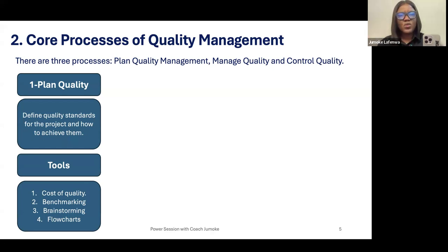The second one is when you spend money to randomly select items so that you can inspect what has been done. So you have cooked, or maybe you have produced shoes, and then you have testers. They will just randomly pick, and whatever they pick, they test. The outcome of the test will inform them whether generally the production is good or not. And so this is also part of the cost of quality, because you spend money in conducting this inspection.